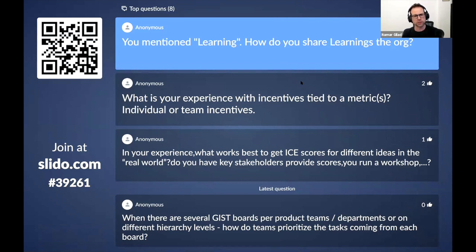Once you are convinced you learned something, you need to share it immediately. I would suggest having a regular newsletter about your projects to all the interested stakeholders. Or you can do a little video and share it, or a little presentation, but immediately share with them and say, this is what we learned, and here's what we're going to do next. And if you think otherwise, if you think our interpretation is wrong, tell us. This is more important than we think. They really appreciate the learning and the feedback.